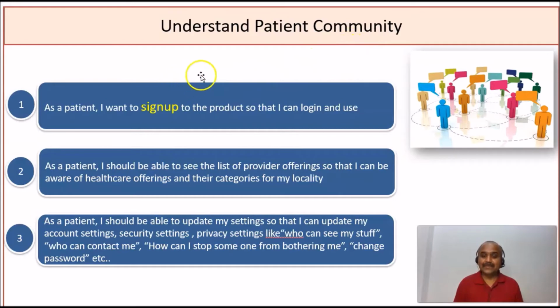That means in a typical user story template. That means as a user, I want this functionality so that I can achieve this. So likewise, we wanted to understand the patient community needs. So it says, as a patient, I want to sign up to the product so that I can log in and use. So I should have the ability of signing up to the product as a patient.